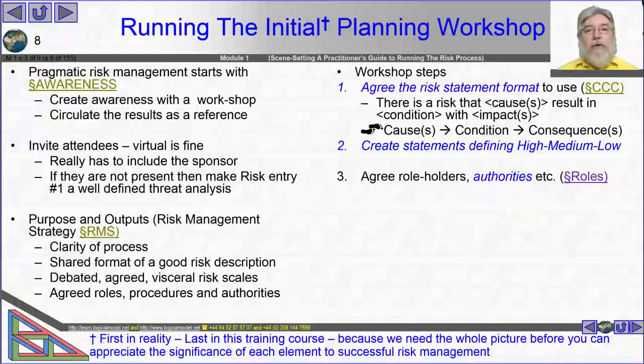So we may have a single consequence, like the project is delayed, and all your contract staff think yippee because their contracts are extended, where your investor thinks that that's very bad because now their costs are escalating. So if we're going to manage risks, that is to say conditions, we're going to need to understand consequences from different stakeholder perspectives. So we'll have to get into that later. I'm just trying to give you an overview at the moment.